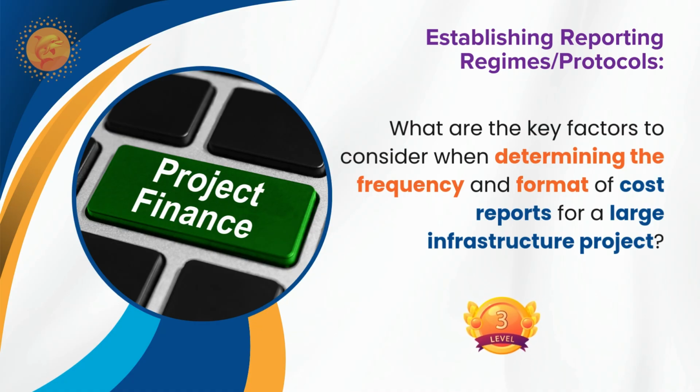In the format, we consider the executive summary, then contract data, then till-month-end cumulative work done, current month work done, progress at site, then approved variations and claims, anticipated variations and claims, then loss and expenses claims in the project, then anticipated completion, anticipated contract price for the project, balance work in the project, and at the end we mention the changes in the current report with respect to the previously submitted report.